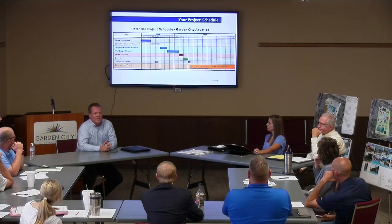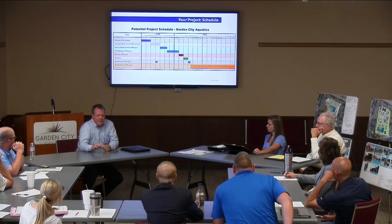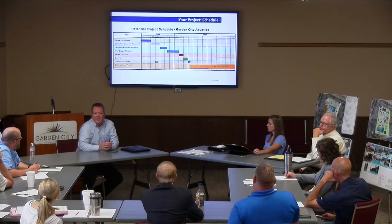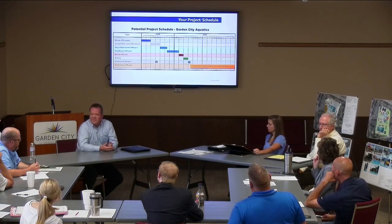I think your question that you asked here was really about what it takes to build a facility of this size. We think that a good starting, the best case scenario would be giving them 12 months to build a substantial aquatic center water park, like you're talking. You can shorten that duration. We've done it shorter, 8 or 9 months. It can be done.